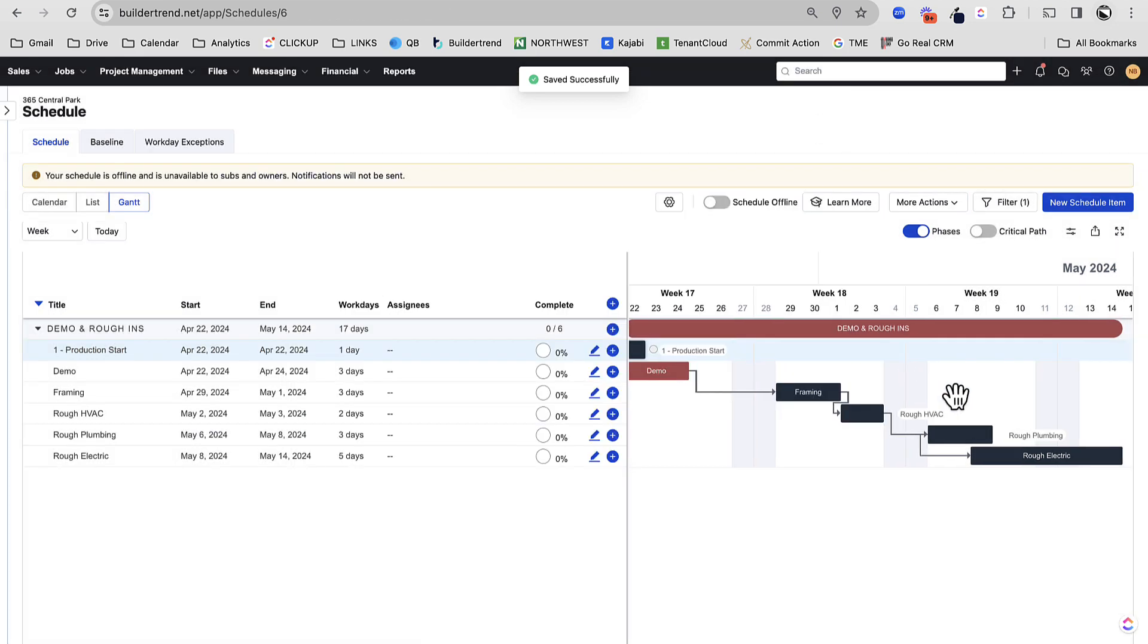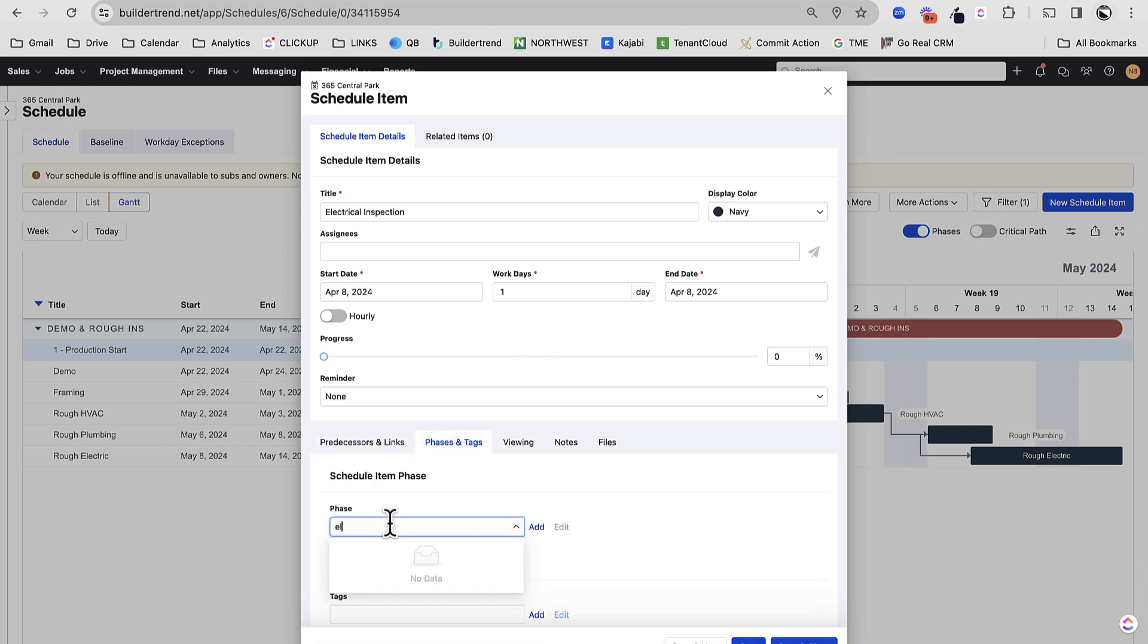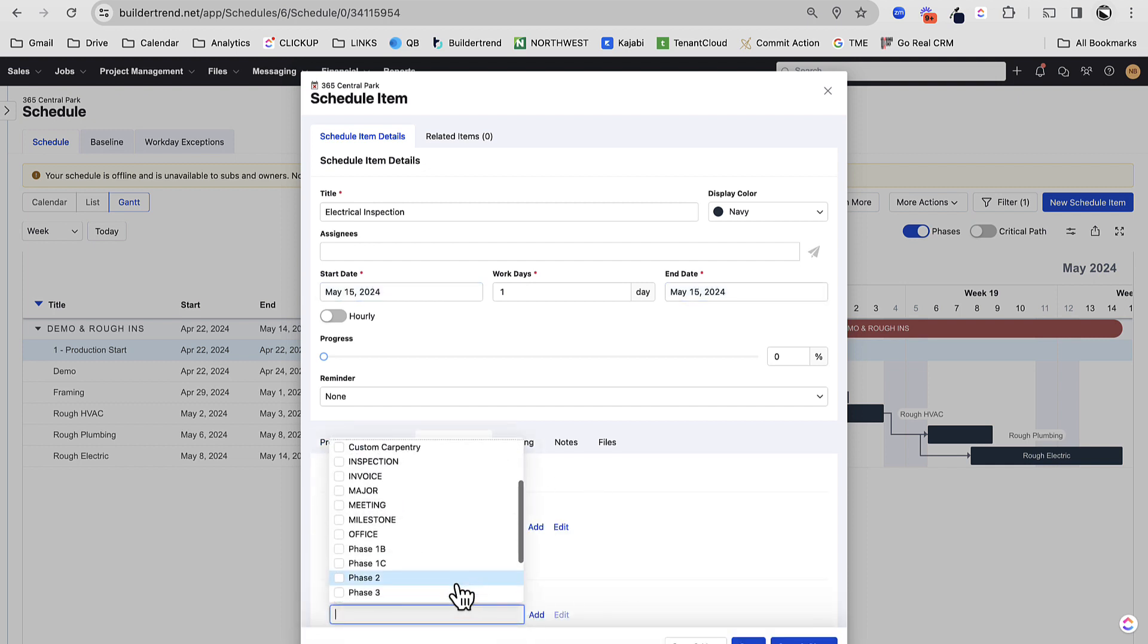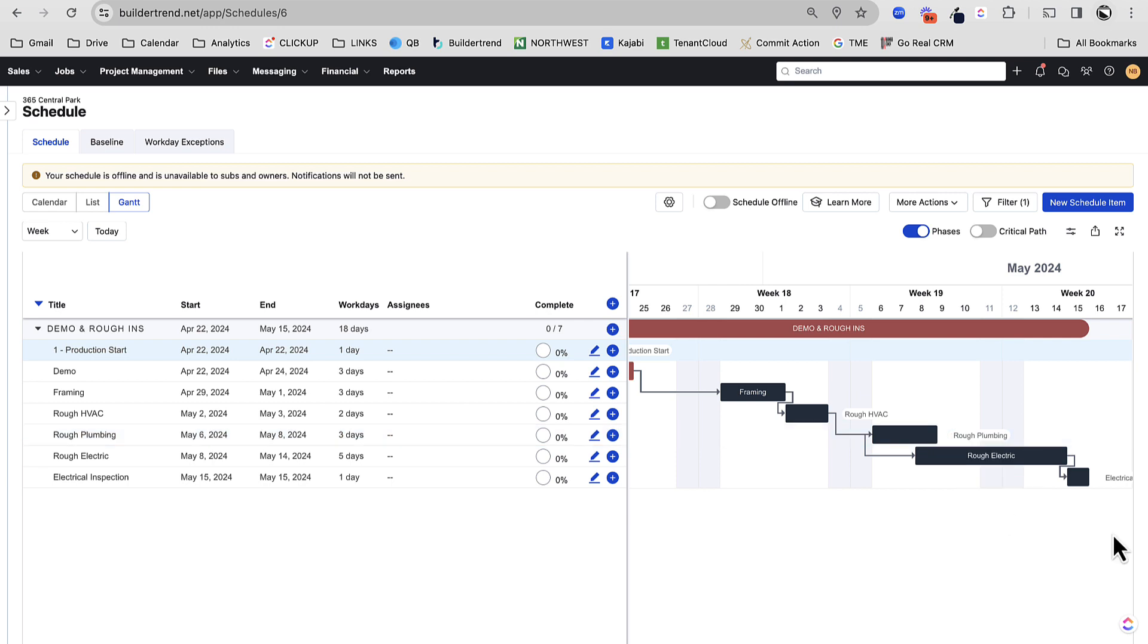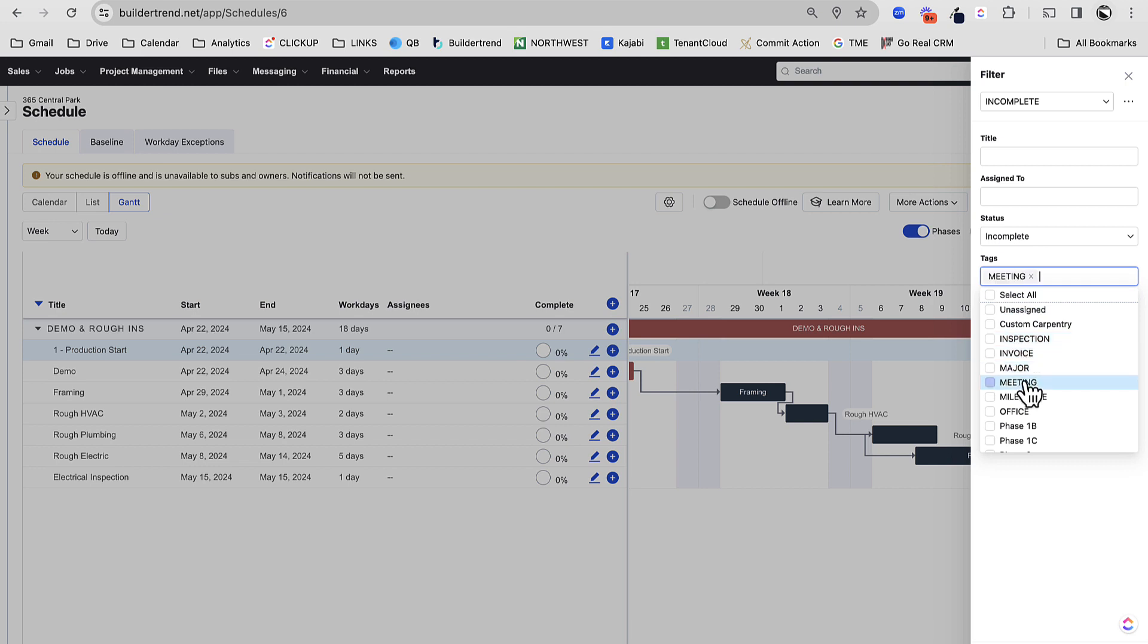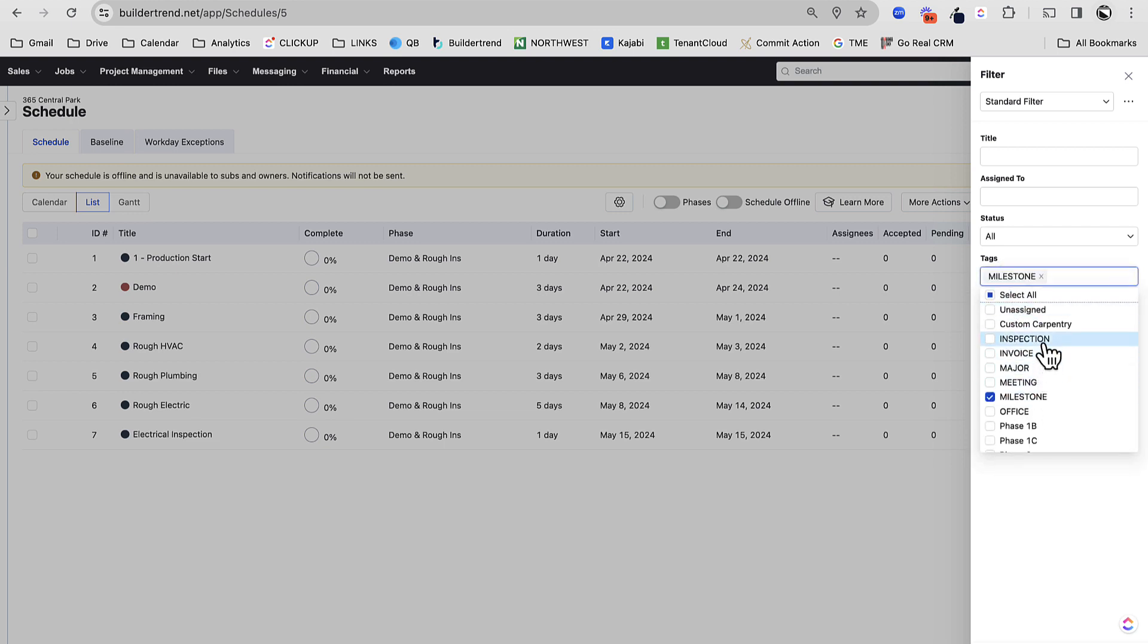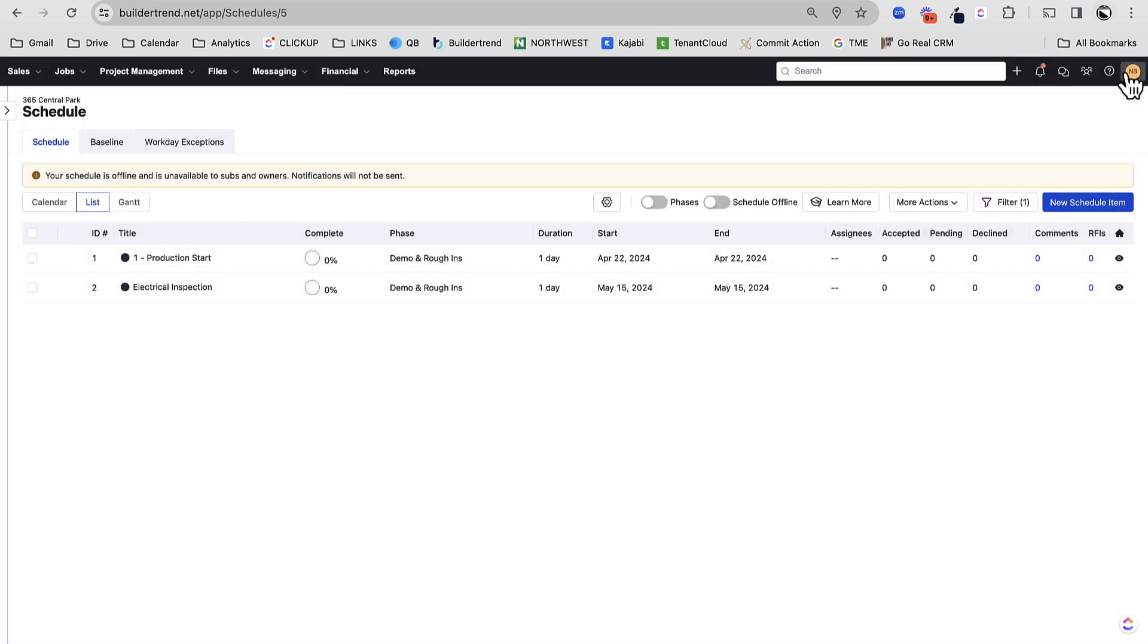We could have like another milestone. For example, we could say that like we have an electrical inspection. Maybe I'll leave that one Navy. And that's dependent on my rough electric. That's demo rough ins. And that's dependent on my rough electric. Once rough electric is done and maybe this tag you could have as inspection and a milestone. And this is an example where now I can take my schedule, whether I'm on the Gantt or on the list and I can filter and I can say, give me anything that's a milestone and apply that filter. And that'll give me those. And that's really useful for looking at like a list. So here's a huge list of all the stuff we got to do. I can filter this list down by just the milestone tags or maybe just the inspections. Super useful. I find this to be a really good way to help communicate with third parties, whether they be designers or vendors. Hey, what dates do you need stuff by? We'll build into our schedule, all these different specific dates that are dependent.